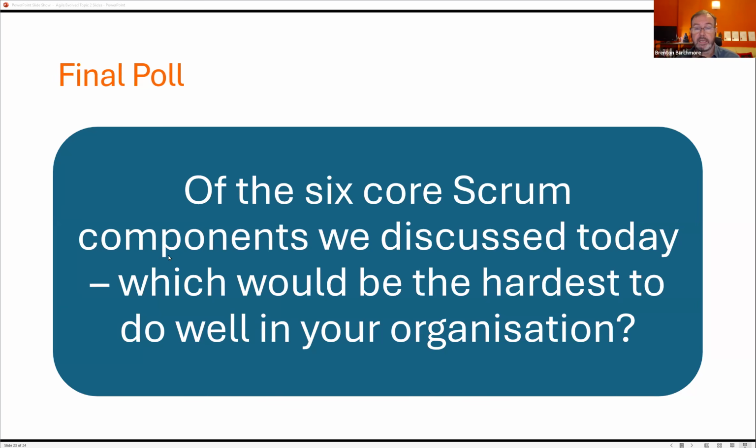But it's not an expectation on the delivery team to somehow suddenly work more, work harder, work more clever, have all the answers. That's not how Agile works. Unknowns are unknowns. Empirical means empirical. You can't just say, I've got a fixed budget, and so therefore all the answers have to be now. It's a trade-off. It's the opportunity cost. If you have to spend money on exploring and you're running low on money, then it comes down to what features you are willing to live without. Absolutely. It's always opportunity cost.